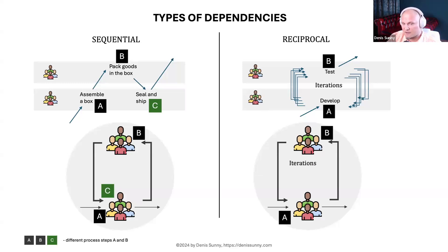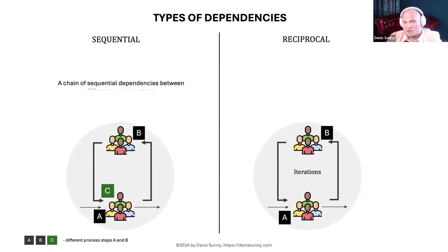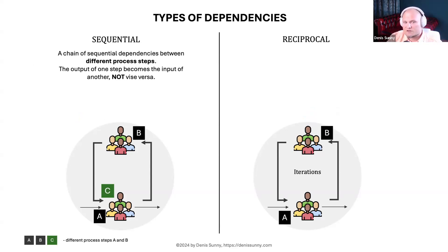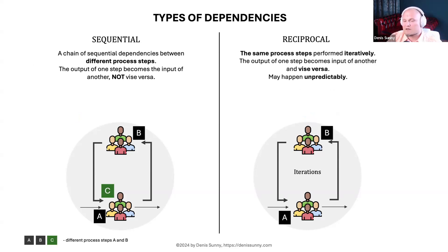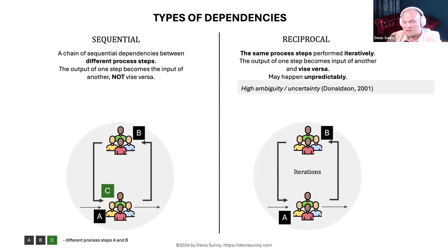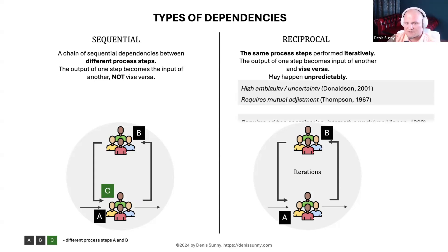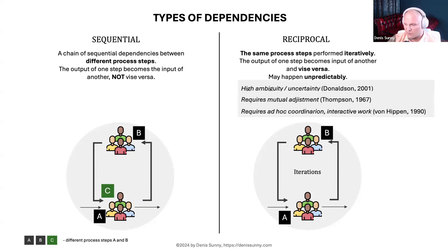The key distinction is whether the inputs and outputs swap and whether a step repeats. In sequential dependencies, there's just another step to tackle. In reciprocal dependencies, the inputs and outputs swap and a step iterates. Scientists in organizational design characterize reciprocal dependencies as having high ambiguity and uncertainty, requiring mutual adjustment, ad hoc coordination, and iterative work.